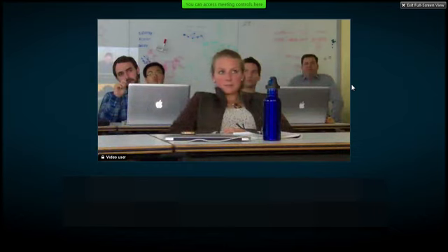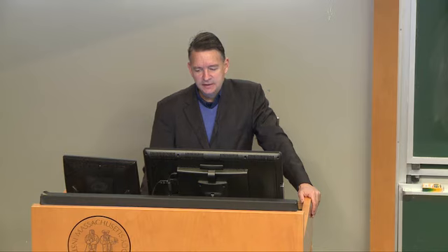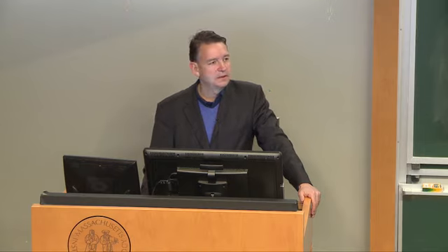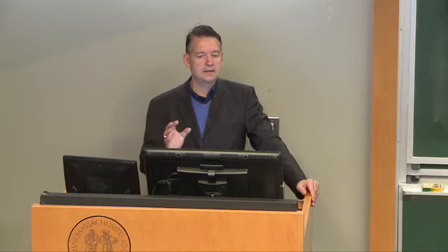Right, so it's asymmetric. You see that? It's asymmetric. So the high impact, low probability corner is weighted more heavily than the low impact, high probability. And that's intentional because it's been shown in the past that things that are not likely to happen, but if they happen, they're really bad, in the past, people have sort of pushed that away and ignored those.